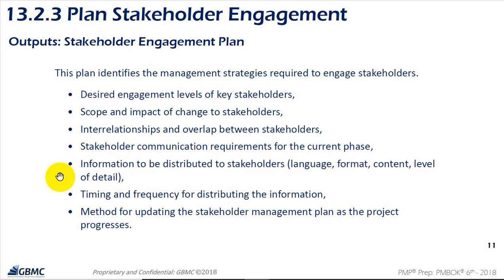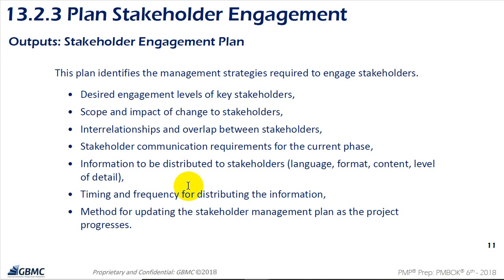The plan also covers stakeholder communication requirements for the current phase: whether they prefer face-to-face meetings, emails, or electronic reports. It specifies the communication information to be distributed — language, format, content, and level of detail. For example, top management usually prefers summaries, while others may require more details.